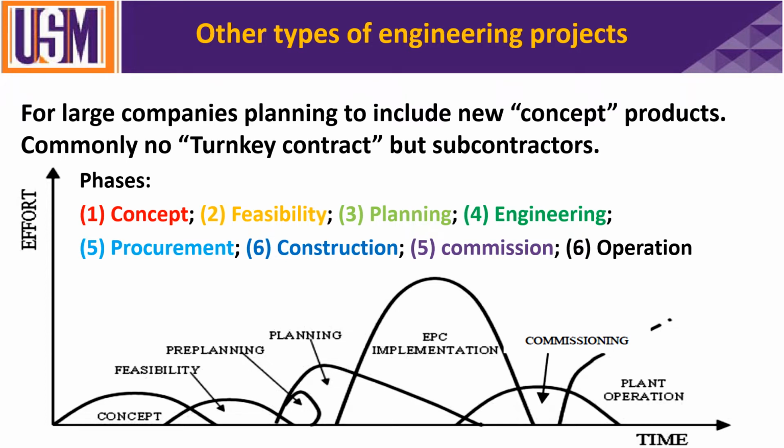So the concept will overlap with the feasibility by the end of it. So the concept is proven and calculated, maybe simulated. Then you will have the feasibility. Then you will have the planning. The planning starts with the pre-planning, then the planning. Then you will have the EPC.